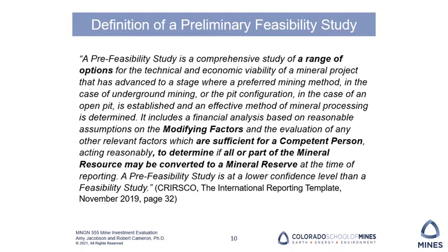It includes a financial analysis based on reasonable assumptions on the modifying factors and the evaluation of any other relevant factors which are sufficient for a competent person acting reasonably to determine if all or part of the mineral resources may be converted to a mineral reserve at the time of reporting. A pre-feasibility study is at a lower confidence level than a feasibility study.